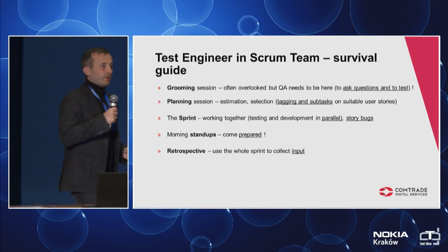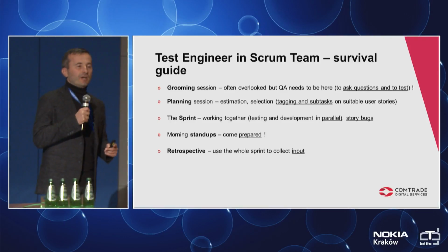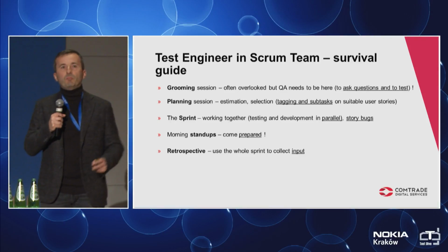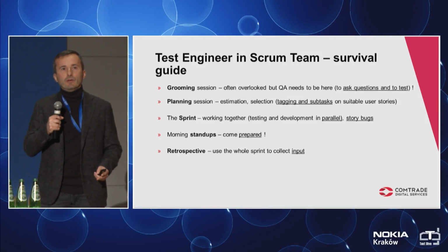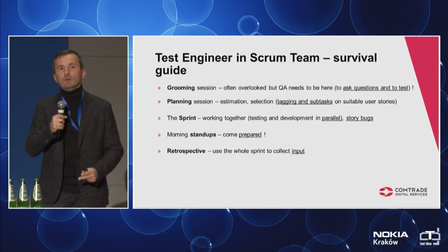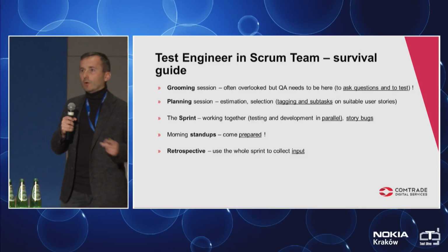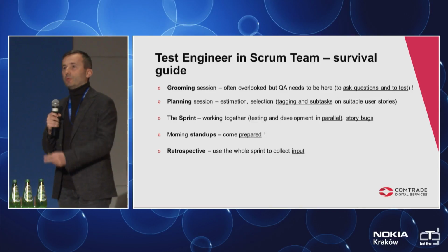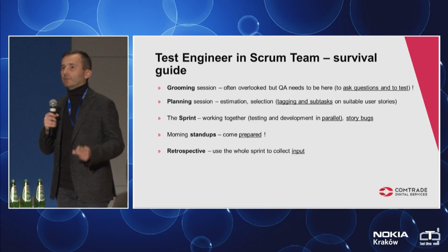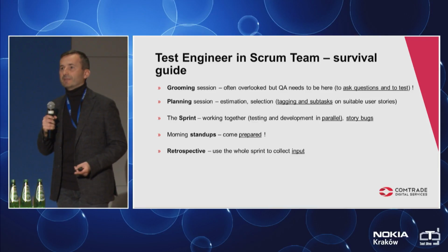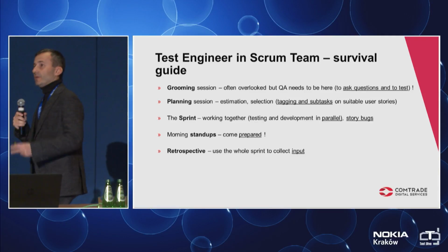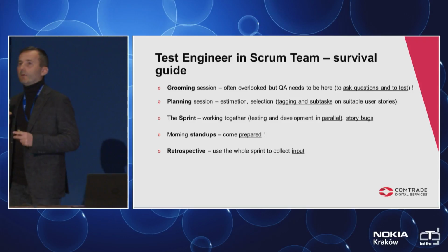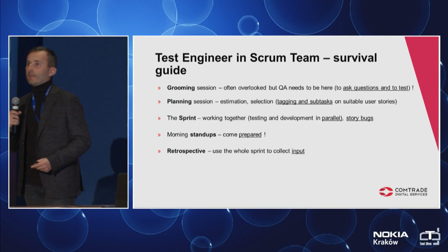On grooming session, a new idea is just words on a paper, so it's not really expensive to fix something. You're just rewriting it in a user story. Once the code is developed and pushed to production, it gets 100 to 150 times more expensive to fix. So even if QA people are on grooming session or refinement, they often forget to test the new idea.